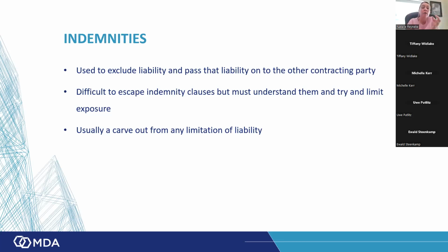So he has to now add it on his price. And then if it occurs, he's like, okay, well, it's fine, I've actually made provision for it. But those kind of discussions need to be had at tender stage, and there are ways of dealing with it. I just think it's difficult to put that specific instance into a force majeure, because the definition of force majeure says it was so unreasonably likely to happen, and that doesn't tick that box. So we can't even use the force majeure.